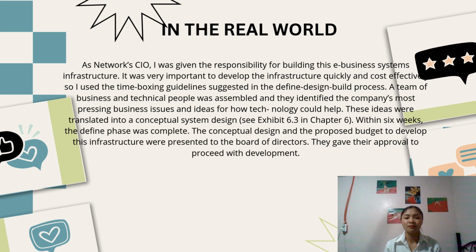A select group of consultants was brought into work with company IT staff. Four project teams were created, one team to design and build each of the four components of the e-business infrastructure. Two of the project team leaders were from the Network IT staff and two were consultants. There was also a two-person project office team headed by one of Network's IT managers.